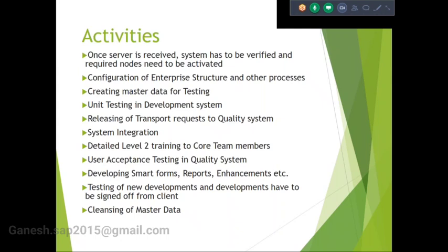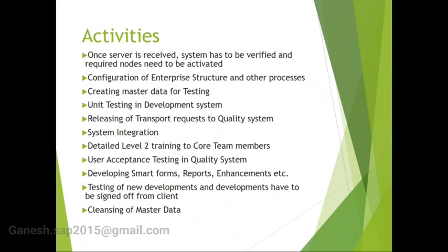If you don't train properly, and they don't understand the solution properly, then they cannot test with different scenarios, and they will not come up with any questions. So all these concerns will be identified only during go live, after go live. During that time, it will be very hectic to fix the issues and all.